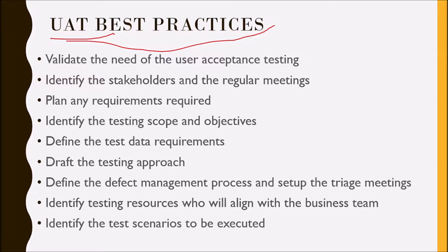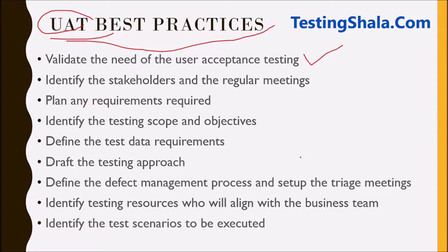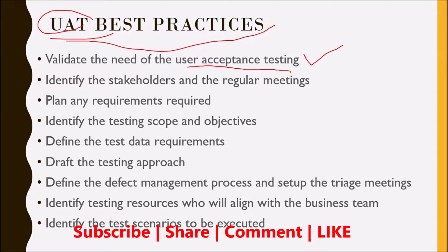The first best practice is we need to validate the need for user acceptance testing. Not every project requires UAT. It needs to be validated with the stakeholders — end users, business users, or product management — to confirm whether there is a real requirement for the UAT phase. If they say yes, then we will move on to clearly define what are the things we should do in UAT.